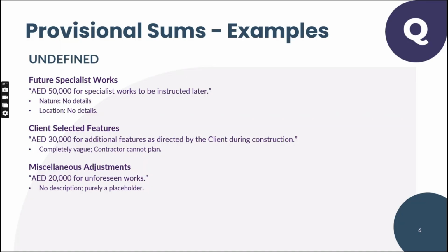As a client or consultant, you prepare the budget for the original contract. Then for the defined proportional sum items, you say based on the information 90% is okay, so we can consider this amount plus, say, 10% contingency. So this is the amount for the defined proportional sum.